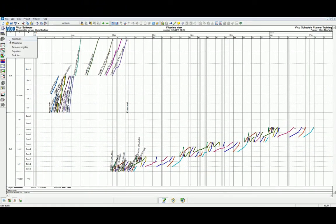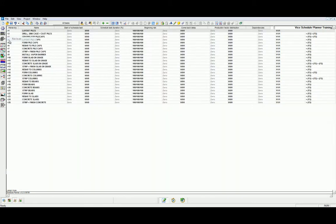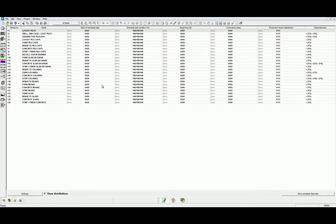Let's navigate to our spreadsheet menu into the risk levels dialog and start to assess the different risk levels for each task. As a default, all risk levels will be set to zero. It's important to coordinate this portion of the schedule with the attending superintendent, or even better, to include the subcontractor. By understanding their expectations, we can now assess the schedule as it relates to their perceived notions for each different risk level associated.